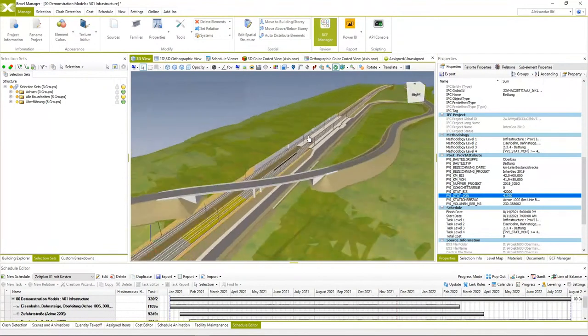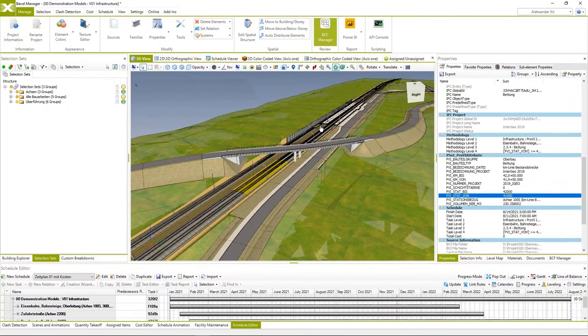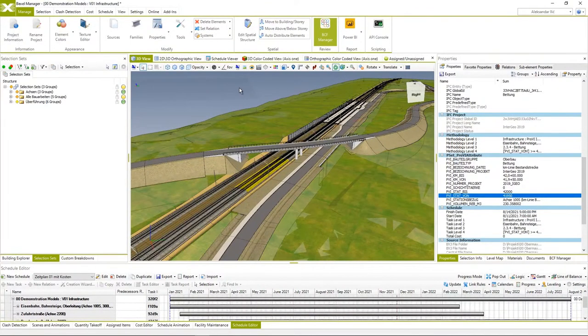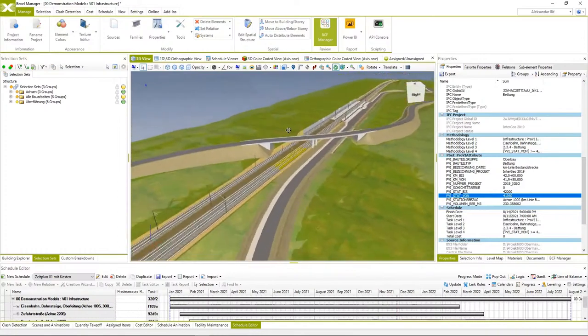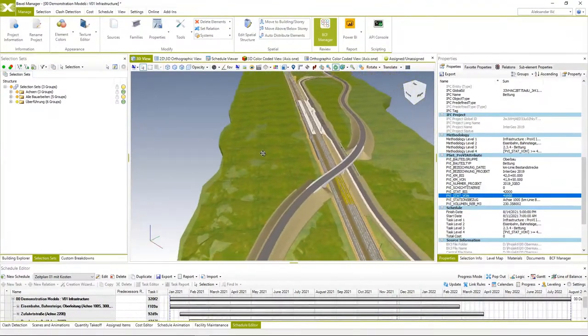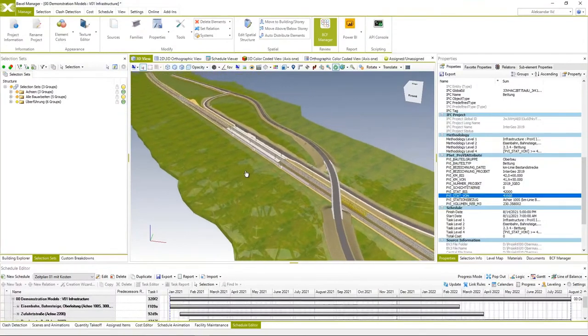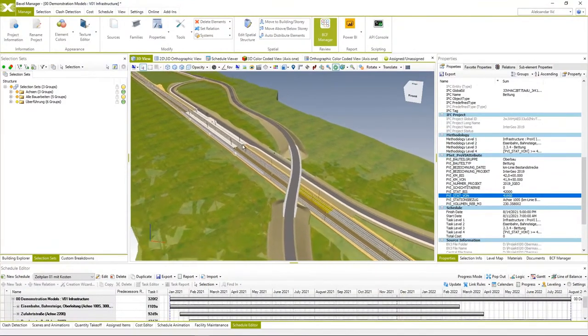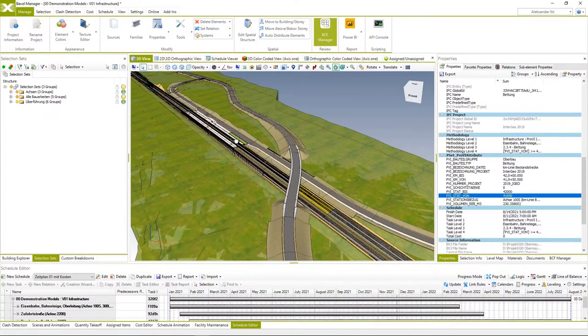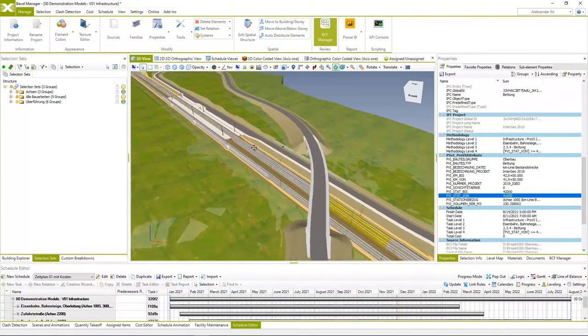But if we want to specify sections or the chainage of this infrastructure project, that means if we want to segregate it into equally long sections of this linear infrastructure project, let's say 50 meters long, we would need to create a series of smart selection sets based on these two properties, the axis and the chainage value, and that will combine multiple sections, multiple elements into, let's say, areas of 50 or 100 meters equally long. That will be one step in execution, let's say.